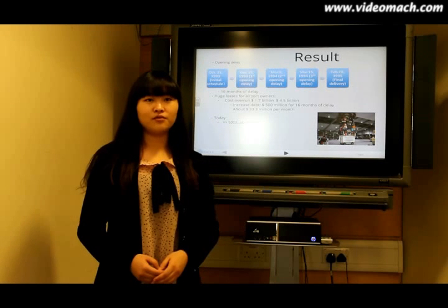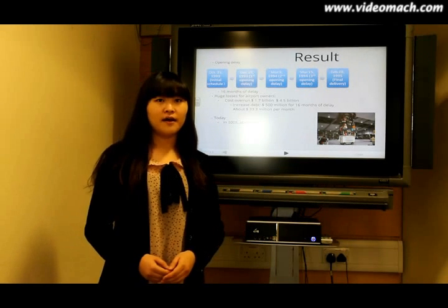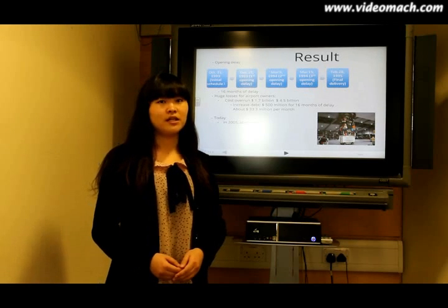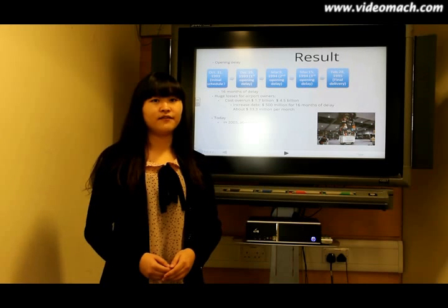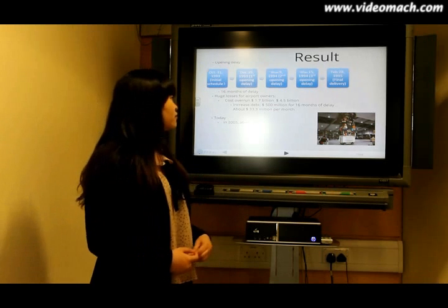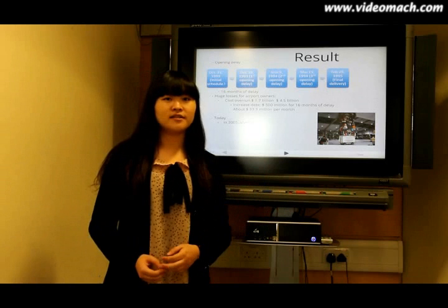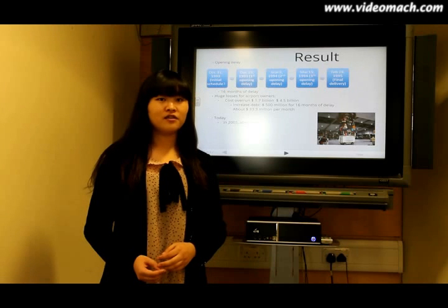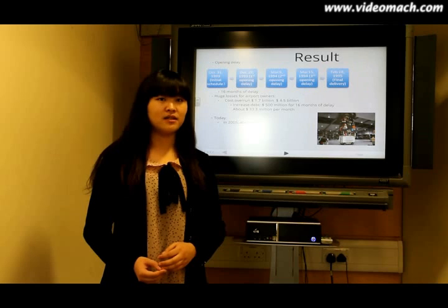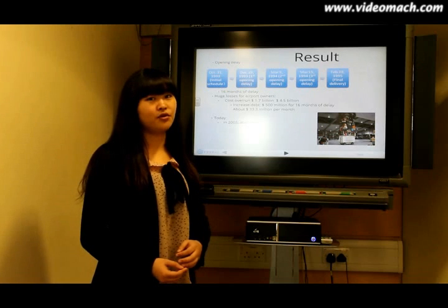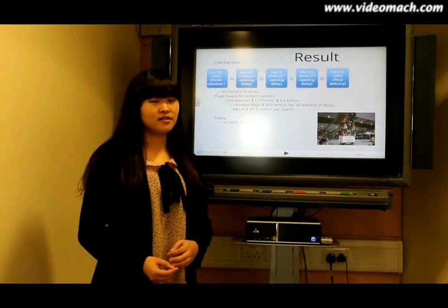In addition, the airport owners suffer losses to the extent that the automatic baggage handling system does not deliver the productivity and efficiency that they had bargained for. The total cost overrun is about $3 billion, and the delays have also cost them around $500 million to date, and it costs about $33 million a month. Finally, in August 2005, it became public knowledge that United would abandon the system.